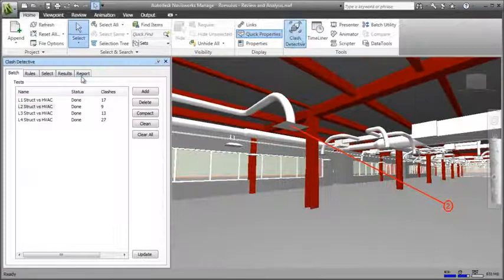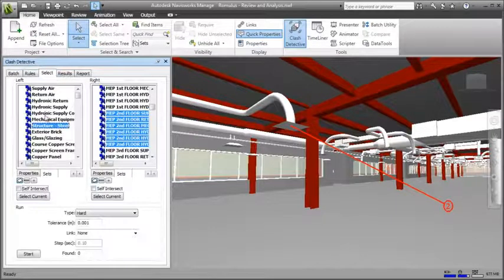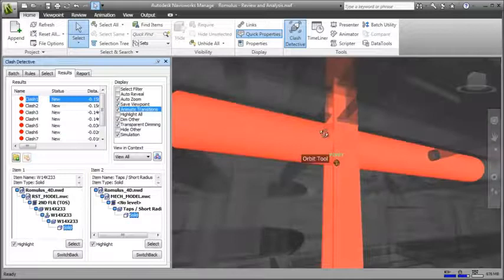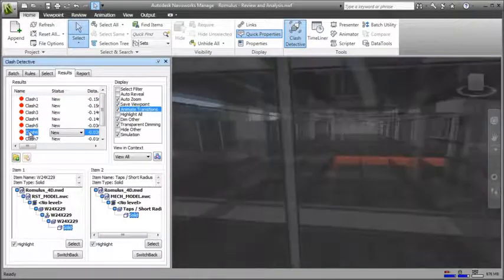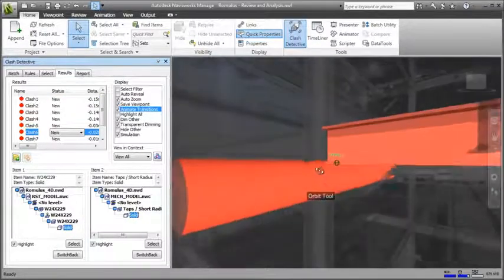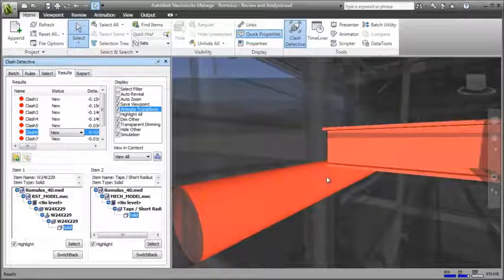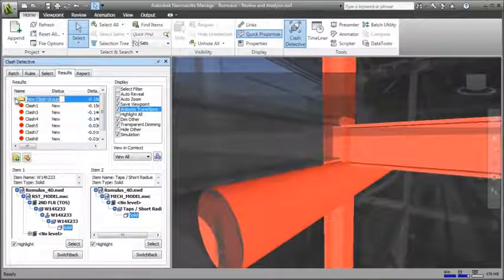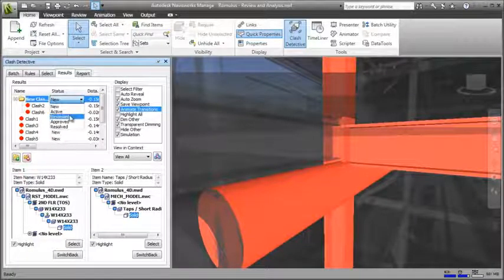Navisworks further delivers powerful analysis tools, including clash and interference analysis, management and reporting tools that enable users to find and address coordination issues virtually before getting to site, which can generate an enormous return on investment. As well as finding conflicts, you can manage these too. For example, grouping clashes that involve the same element enables you to deal with them together as a single issue, and using comments, statuses and reports to communicate and track these issues through to resolution.